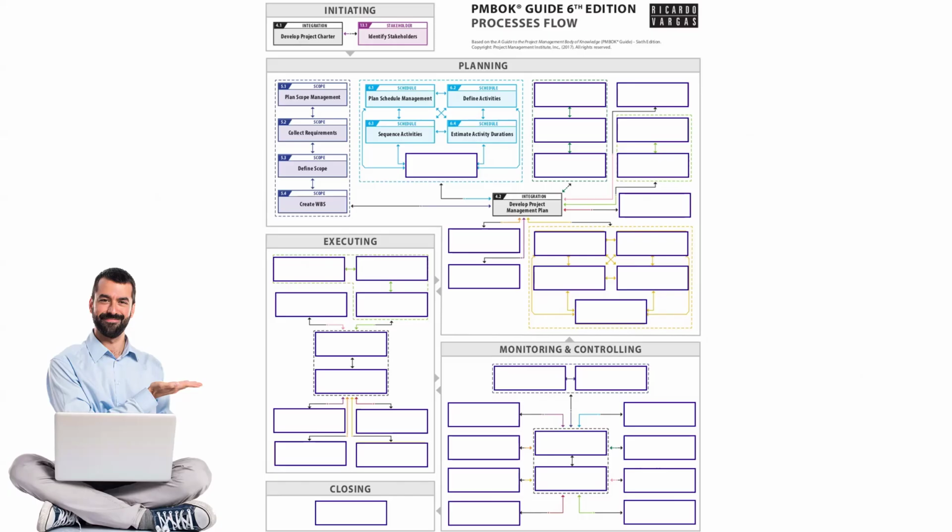Once you have the critical path, that can be translated into a Gantt chart. That is your schedule. Then at that stage, we develop the schedule. Schedule, it is like a Gantt chart. Every activity, starting time, ending time is defined. Length is defined. Everything is defined. Linkages are defined just because we have done that already. Moving on, the third group is cost. Again, we develop a cost management plan.